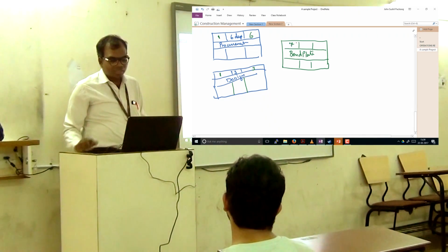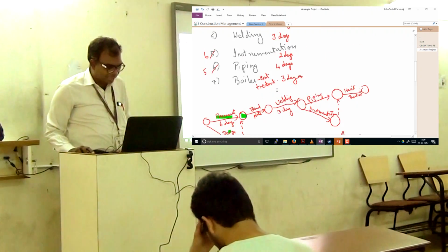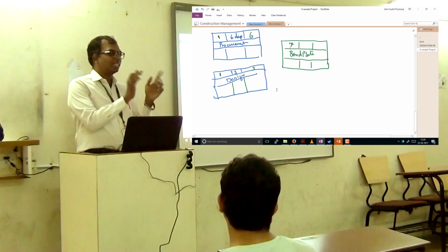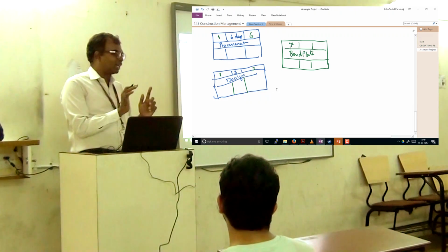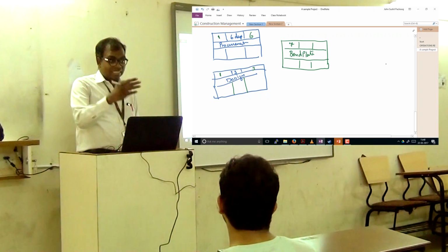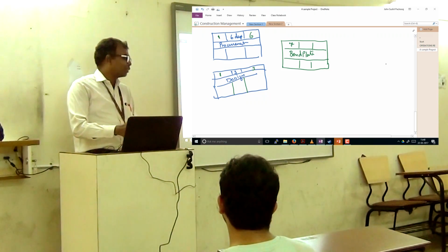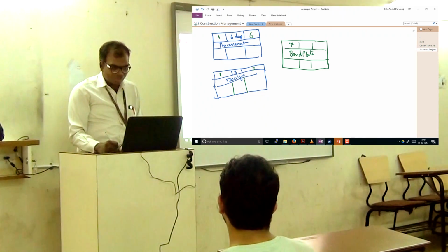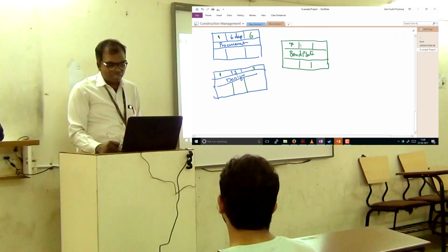Now how many days does bending the plate take? I think 1 day only we put, right? Yes. So if I start it on the 7th, I finish it in 1 day. So when will the early finish be? 7. Today itself it's getting over. Today morning I started, by today evening I finish it. So this becomes 7.